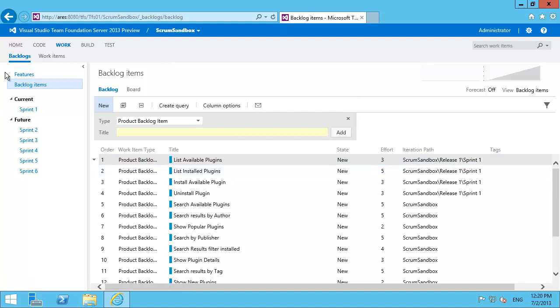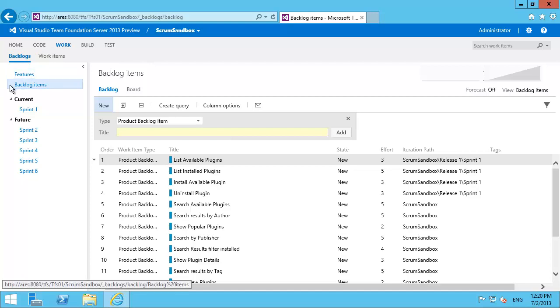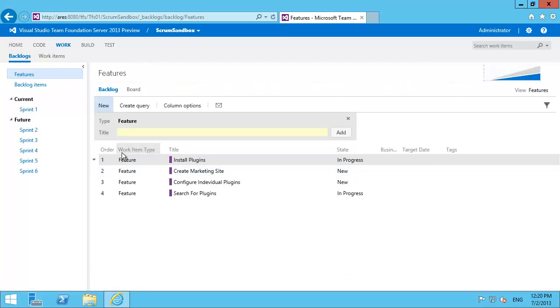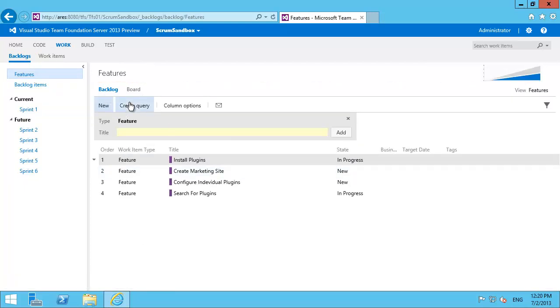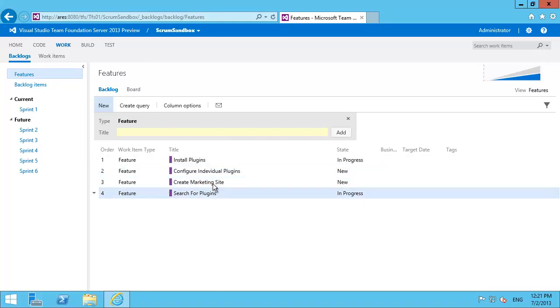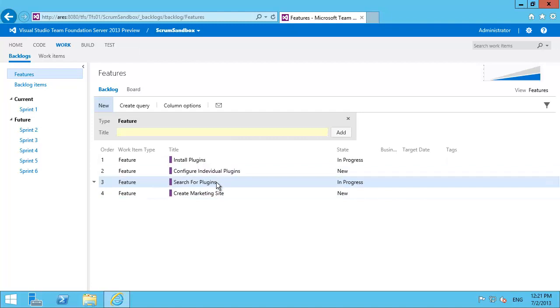But above backlog I've got this features row. Features are a parent of backlog and features get their own backlog and board at that particular level. So you can reorder items in this backlog just by dragging and dropping just like you can for the product backlog items.